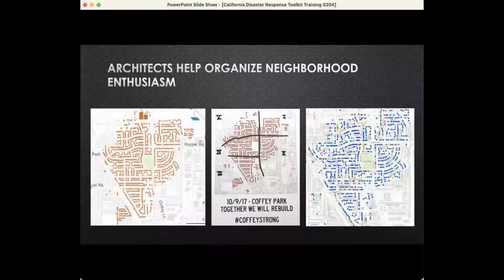The mix of methodologies, using production builders and using other kinds of builders, and then using this community organizing system to drive people to rebuild their home and help them, was that this community was rebuilt faster. Wow, at 2 years, almost every lot was in the queue going through this process. The blue dots in the map on the right show the houses that have building permits at 2 years.